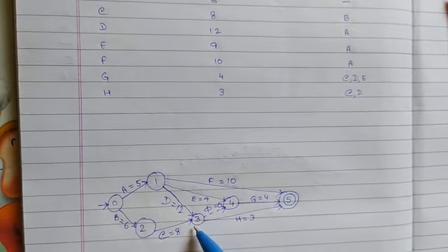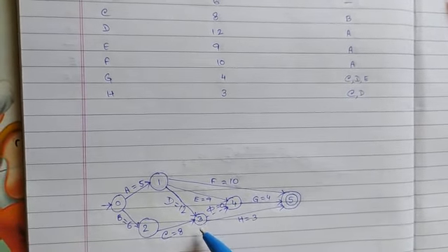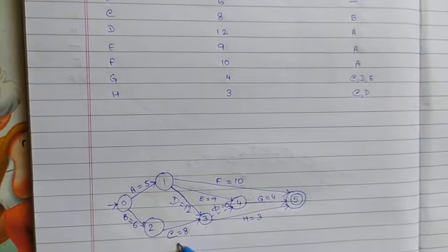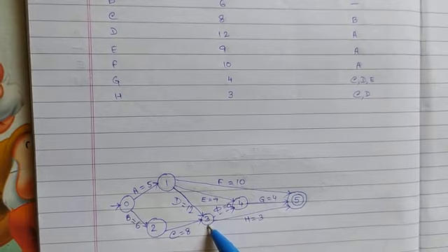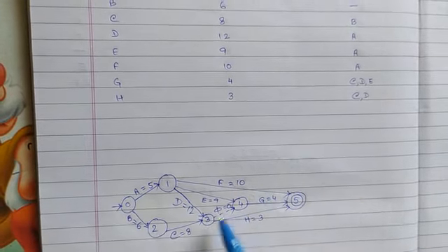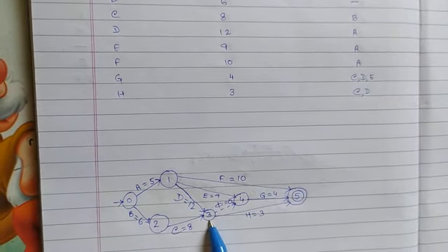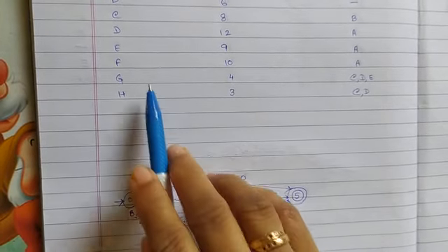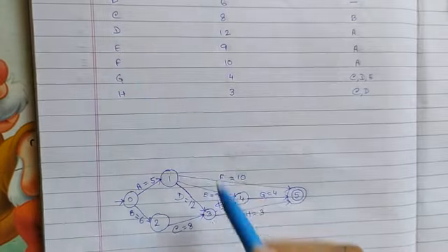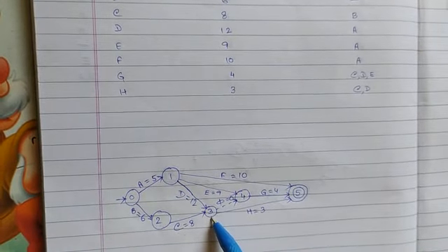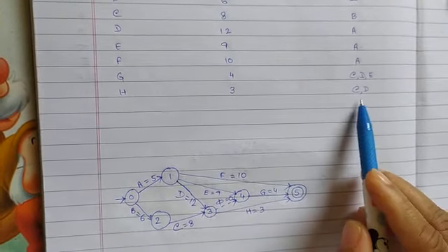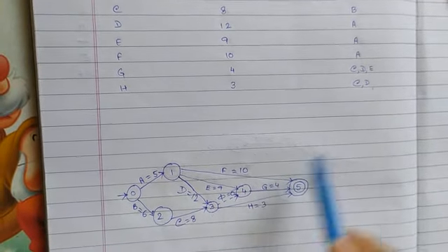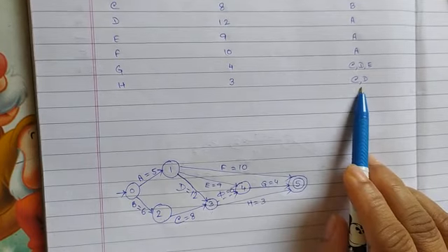Now we have created state 3, where the tasks C and D have met, but G cannot execute from state 3 as G's preceder is C, D and E, but we have not joined E in state 3 because there is another task H which will execute from state 3 where only C and D will meet.